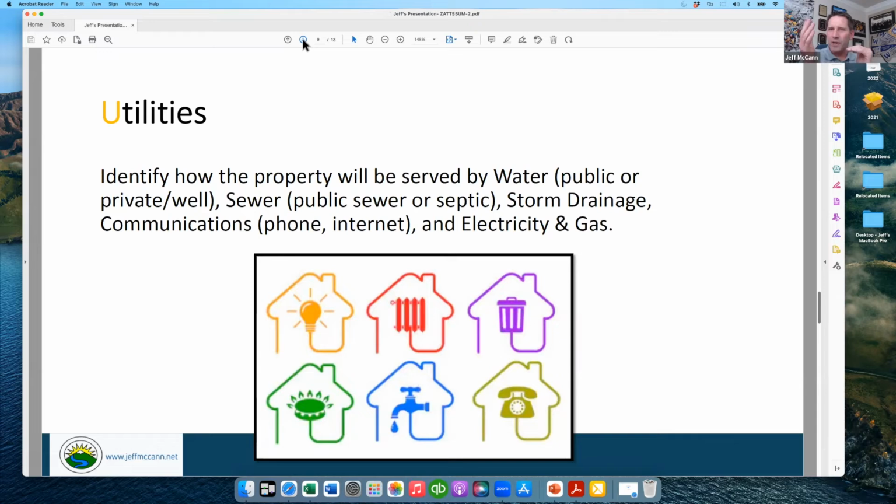And this lot was only listed at like $160,000 for a single family lot. The next sewer to the property is 5,300 feet away. That is a mile of sewer to put in for a single family lot. And the sewer department estimated $780,000 to connect. And so, I don't know why my client bought the property when they did.